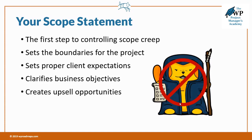As you review the in-scope and out-of-scope sections with the client, it helps to clarify business objectives and also creates upsell opportunities. That's not something you purposefully use as an upsell, but as you go through the in-scope and out-of-scope sections of your proposal, you may come across something listed as out of scope and the client says, 'Wait a minute, I really want that.' So you can add it in and change the estimate for the project.